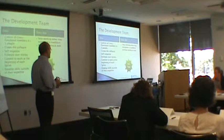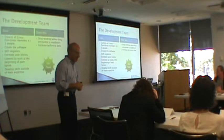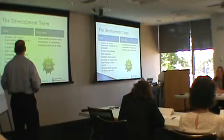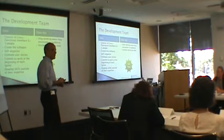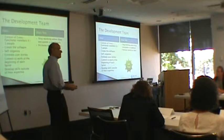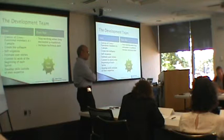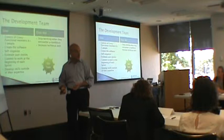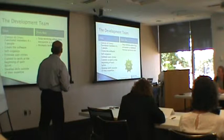The development team in the perfect model consists of six plus or minus three people — anywhere from three to nine seems to be the sweet spot. They create the software, self-organize, estimate user stories, commit to the work they can accomplish each iteration, and develop skills outside their expertise. What they don't do is stop working when they hit a roadblock. In scrum, the expectation is: can I go help someone else? Can I do backlog grooming? Can I help QA? What can I do? And they don't increase technical debt.